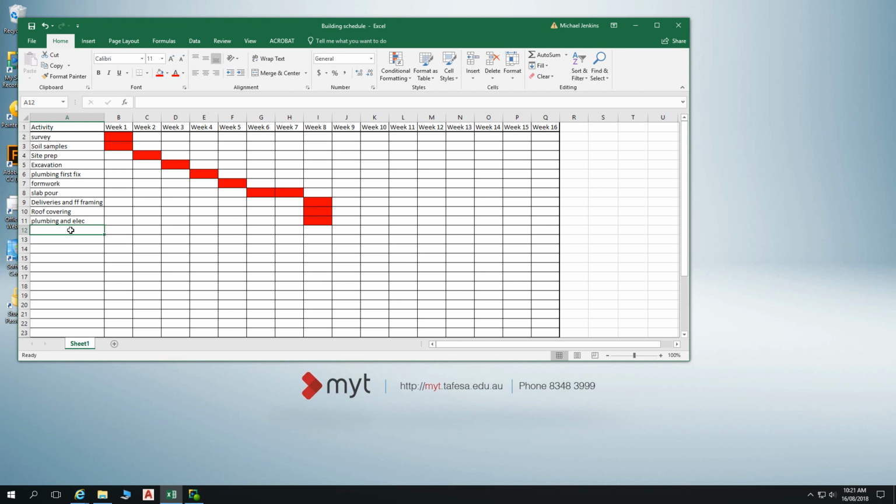So you get your fascias on, then your gutters, and then you start sending everything up from there. Ensure that you've got your holes cut out in your gutters for your pops, the bit that joins your downpipe on. All that is done down on the ground, and then they're sent up. So typically that happens before your roof covering goes on.